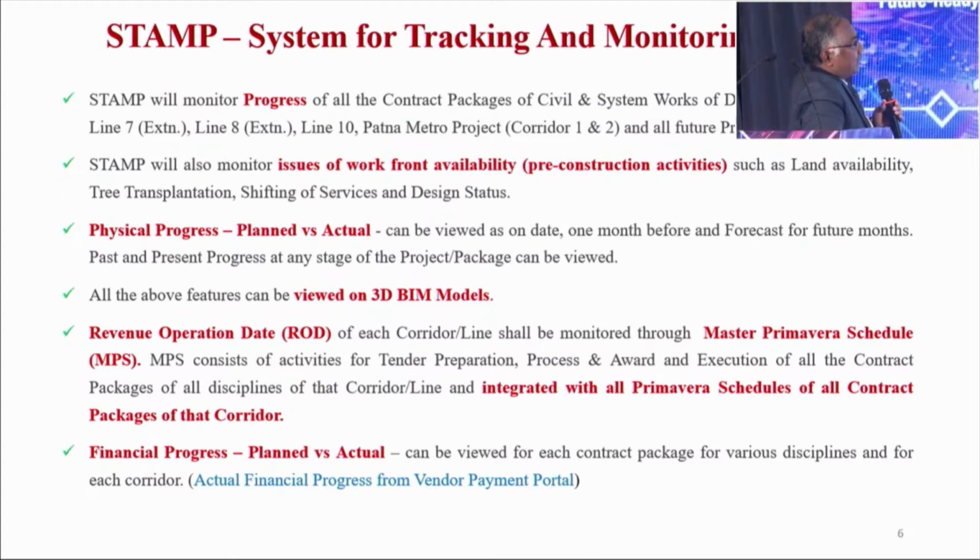This is plan versus actual. Various dashboards are created, so this can be viewed as on date, everything on a real-time basis. Even at a given time, say around 5 o'clock today, you can monitor what the planned progress of each contract is and what the actual progress is. Even if you want to see one month before, where we were and what we lagged during the month,